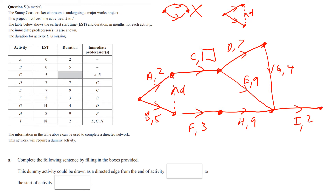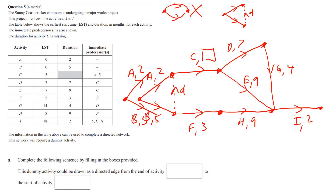You've got to make sure it agrees with your diagram. Starting here with our start node: A and B have no immediate predecessor, so here's A comma 2 and here is B comma 5. We've done A and B. Now C needs to be connected to A and B, but F only needs to be connected to B — so this is why you've got to look at which way your dummy goes.